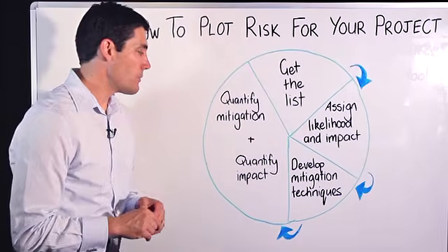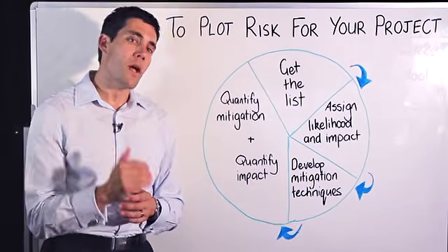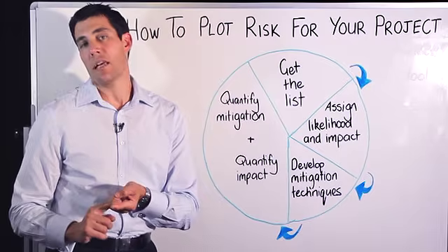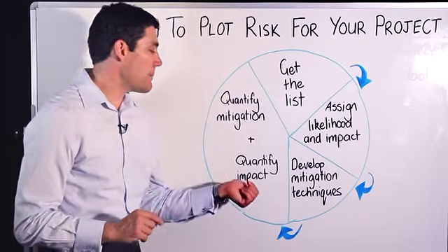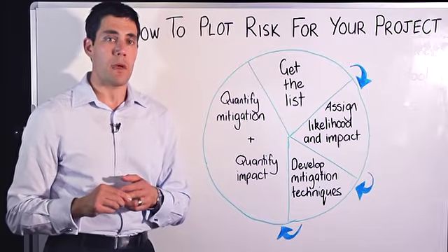Make sure, though, that you've got mitigation techniques for all the risks you have on your risk register. Once you've developed those mitigation techniques, then it's pretty important to quantify the cost of what that mitigation technique might be and also quantify the impact in terms of a dollar amount of that risk happening, what that cost impact might be to the project.